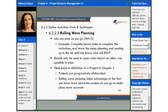Rolling wave planning lets you plan as you go. An example would be if you complete the known tasks to complete the invitations and then leave the menu planning and the seating until later when you know who's going to RSVP. So you know that invitations are coming up soonest — you need to be able to complete those tasks and then leave the rest, like menu planning and seating chart, up in the air until closer to the time that you need it, because those things can wait.